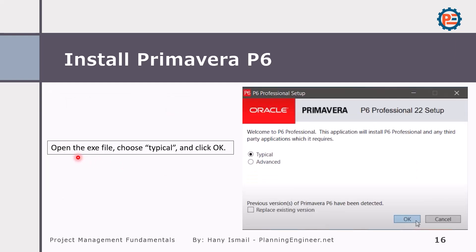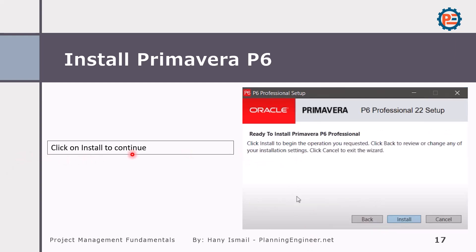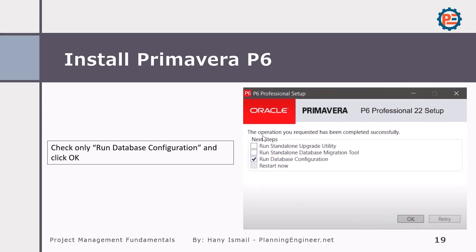Then open the exe file and start installing Primavera. Installing Primavera is a very straightforward process. I will tell you the easiest way to install it, because the installation depends on the database type you are going to use. Click 'Typical' — no need to check 'Advanced,' only 'Typical.' Then click 'Install' to continue and wait for the installation process. Then you will run the database configuration — Primavera will create a database to store your projects. Now we need to make a connection between Oracle Primavera P6 and the database.